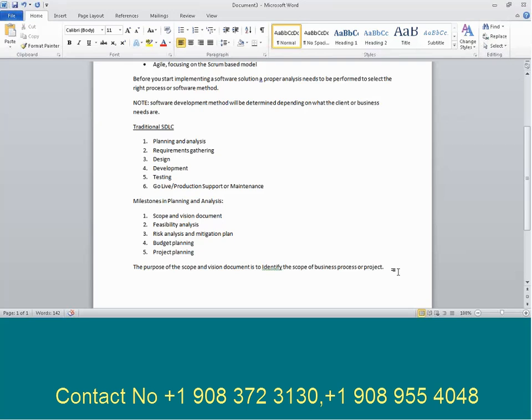You need to mention it very clearly, because if I make a simple statement saying that, okay, I'm going to give you funds transfer, out of this statement, I can make 3 assumptions, right? I can assume that you are allowing me to transfer internally, within the bank. I can assume you are allowing me to transfer the funds externally, outside the bank. Number 3, I can also assume that you are allowing me to transfer funds internationally, outside the country also. So as a stakeholder, I can make 3 assumptions.